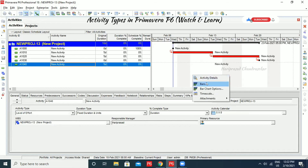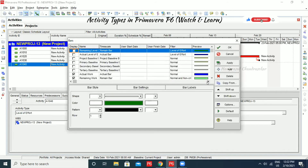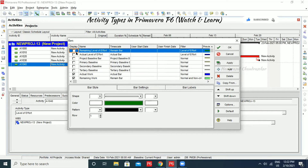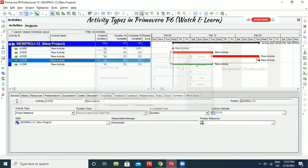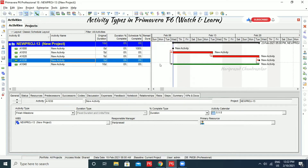To display the Level of Effort bar, right-click and go for Bar. Here you have the Level of Effort option — you need to select Remaining Level of Effort and then Apply, then OK. Now you can see it. For Level of Effort, it is separate — we need to include it in our Gantt chart by clicking Bars. Once I schedule we will see what it is. Going for scheduling now. The Level of Effort will take the duration of its predecessors and successors. We can input something, but after scheduling it will consider only the total duration between the activities.